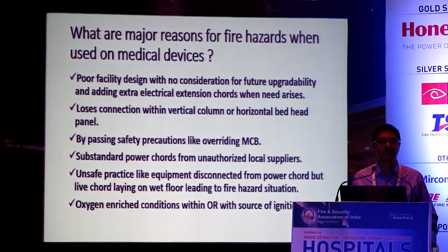I'm fortunate to be a part of the planning and commissioning of four greenfield hospitals. Every time I do face these challenges. When we plan, we talk of all the points, but when it has been delivered, it will be 80% of what has been planned. And when it is practically used, you will have to deviate from what has been planned. So it's very important that we plan, execute properly, and implement it also. If we don't implement, we'll still find extension cords in various places. Loose connections within a vertical column or horizontal bedhead panels.